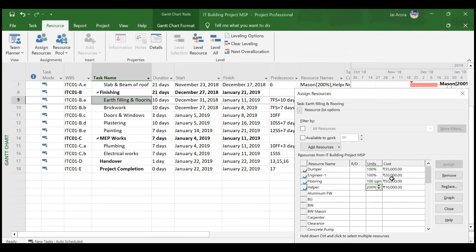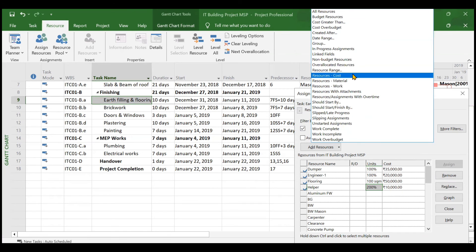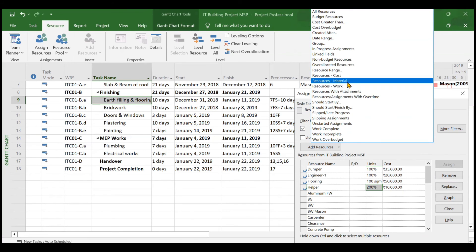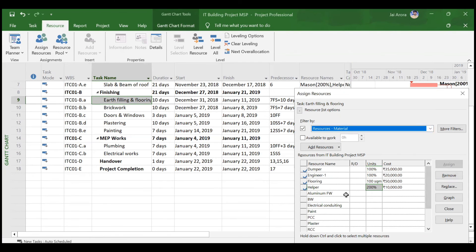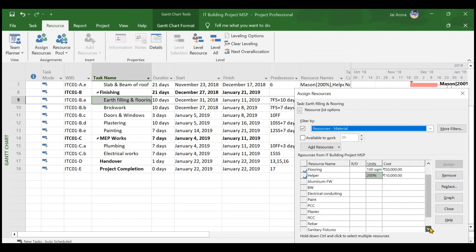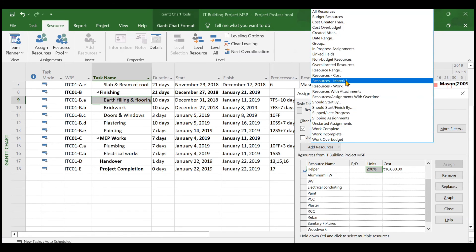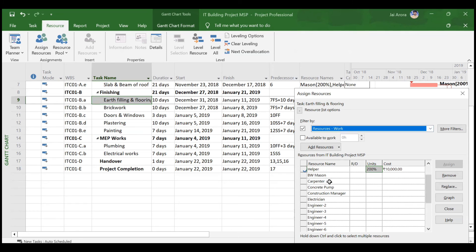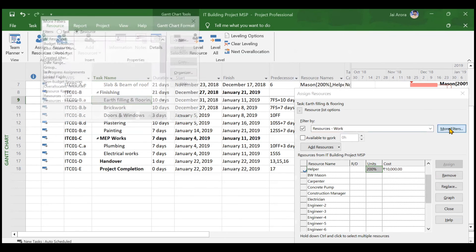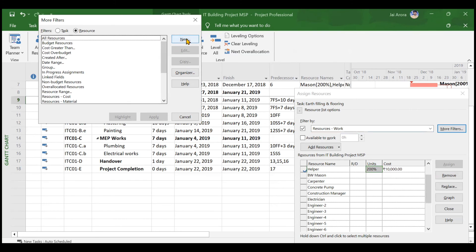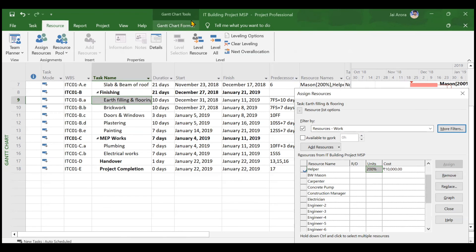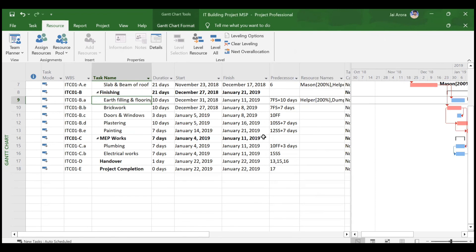In the Assign Resources window, you can also filter resources. By default, all resources are displayed, but you can filter to show only work resources, only material resources, or only cost resources. For example, selecting material resources displays only aluminum formwork, brickwork, electrical conduit, paint, and other materials. Selecting work resources shows only masons, carpenters, and so on. You can also create your own custom filter based on requirements.